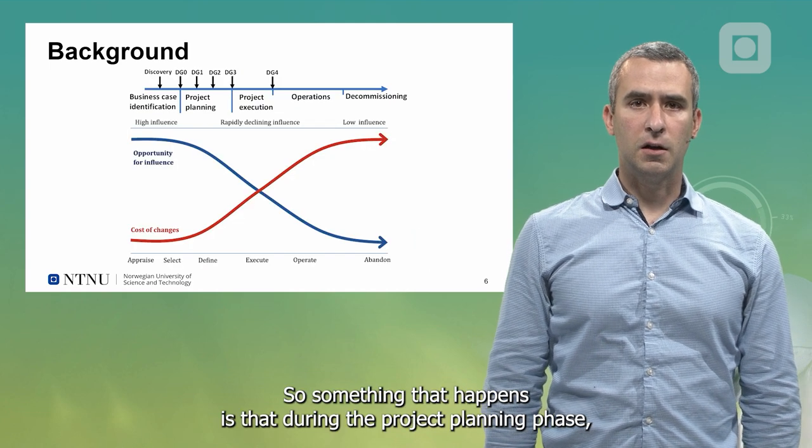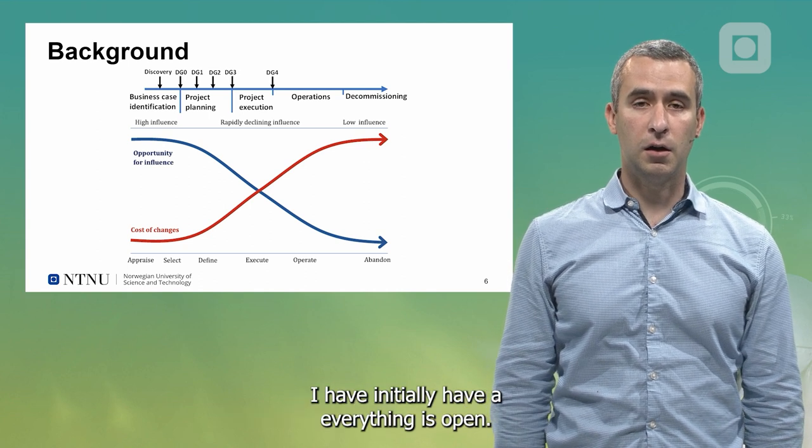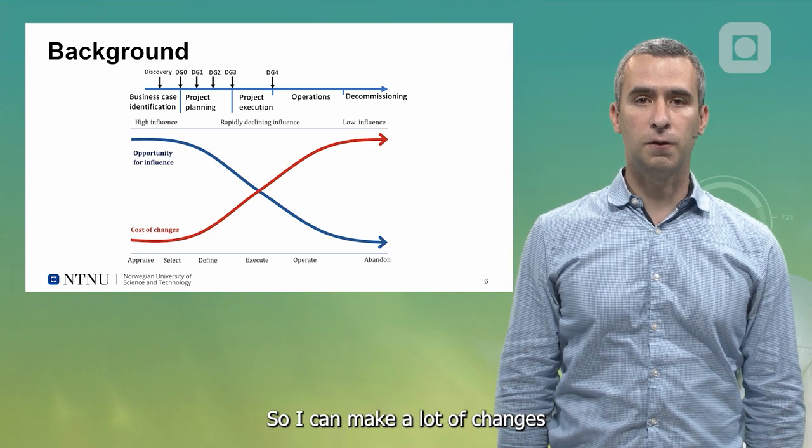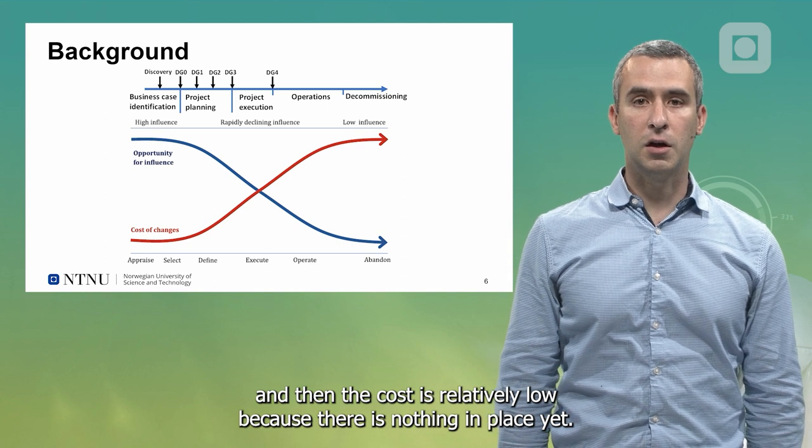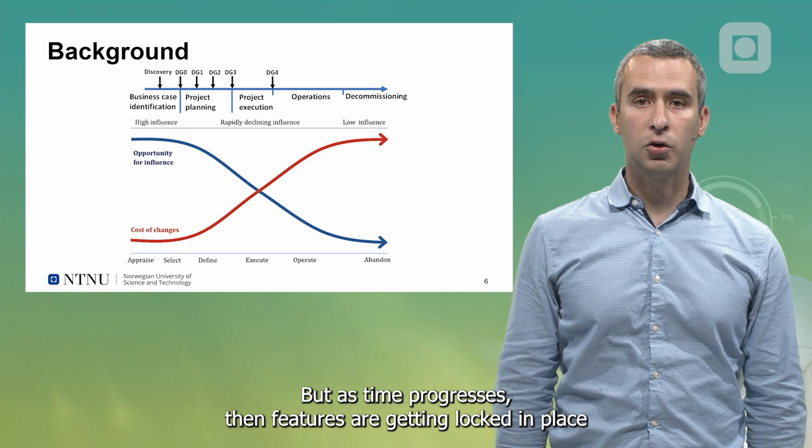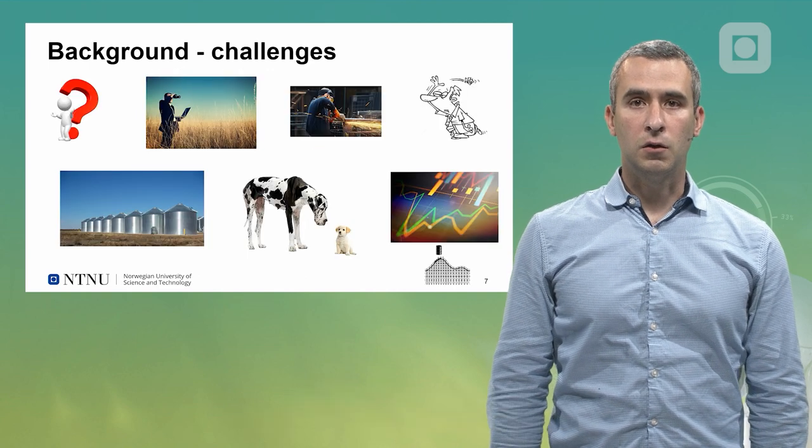During the project planning phase, I initially have everything open, so the system is not defined at all, so I can make a lot of changes and the cost is relatively low because there is nothing in place yet. But as time progresses, features are getting locked in place and it becomes more and more expensive to make changes.